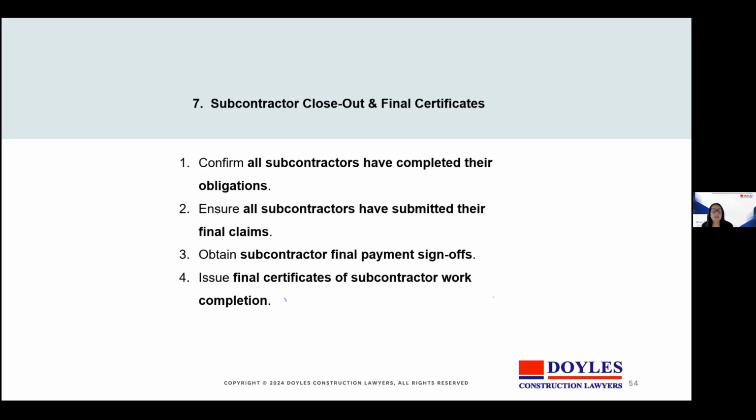So you should confirm all subcontractors have completed their obligations, ensure all subcontractors have met their final claims, obtain subcontractor final payment sign-offs, and issue final certificates for subcontractor work completion.